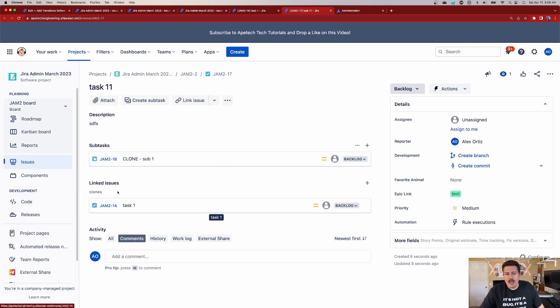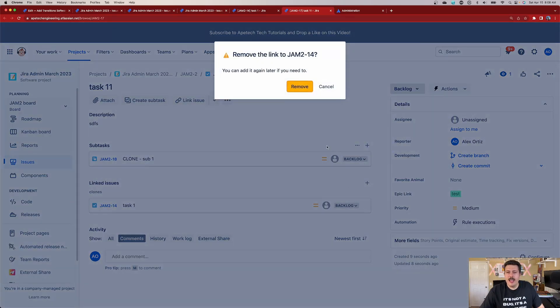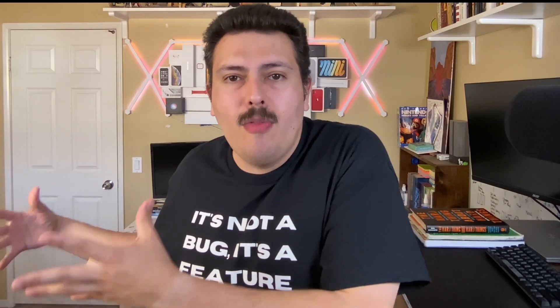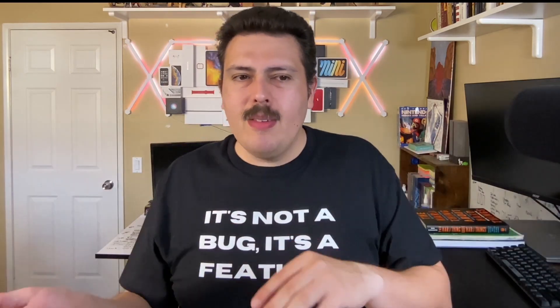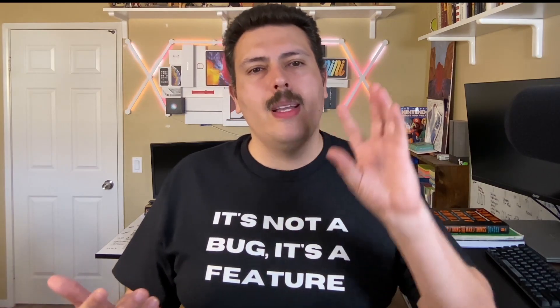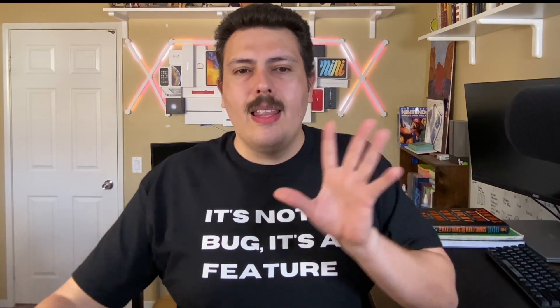You're going to inherit whatever is set for your properties at the global level of JIRA when you clone issues. And then like with the epic, we are linked to the original and we can always kill that off if you don't want it. That's how the cloning feature works. So why do we want to clone? We want to clone because we retain the field data. We retain that information, the reporter, the assignee. All that information that we have in our fields, we basically make carbon copies. Being able to bring in those subtasks is also very important because now we can clone the epic, then we can go clone the children and then link them back up to the right epic.